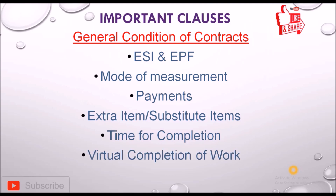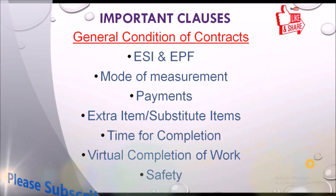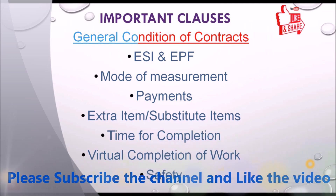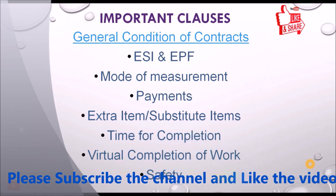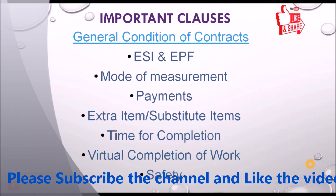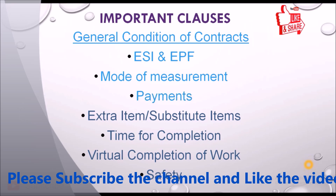Virtual completion of work is the completion of work with minor defects — we give a certificate in the construction field. The safety clause covers all safety codes to be followed, and if the contractor is not following the safety code, a penalty is mentioned. The clauses covered here are: ESI and EPF, mode of measurement, payments, extra items, substituted items, time for completion, virtual completion, and safety.